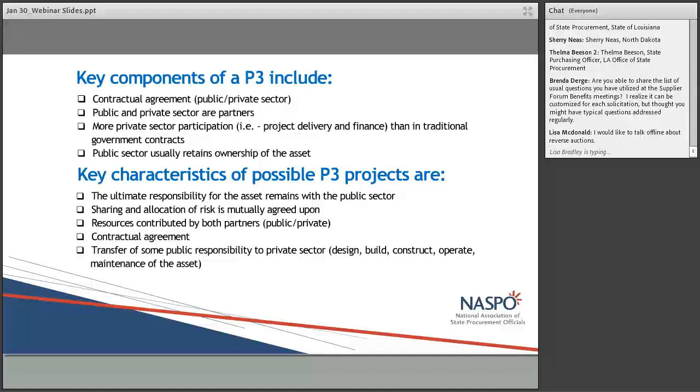There are different types of design builds, which is just designing a building. In these aspects, it saves time. Design and construction are consolidated and overlapped in most instances. There are cost savings due to partnerships. There's a single point of responsibility. There's reduced conflict between designers and builders since they're on the same team and teammates.